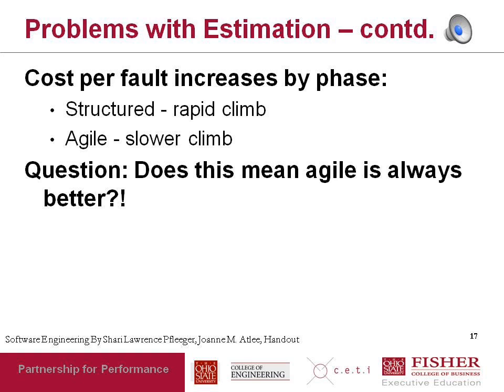Of course, it still doesn't mean that agile is by definition better than structured projects, simply because even though the rate at which the cost of a new feature increases, depending upon whether you figure it out in an early iteration or a later iteration, or early release or later release, there are many more releases and iterations in agile. So you have many more features allowed or discovered earlier. So even though the climb is not as high, you're doing many more releases, and therefore the cost might still be high for incorporating all those features.